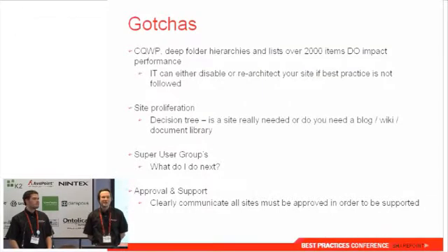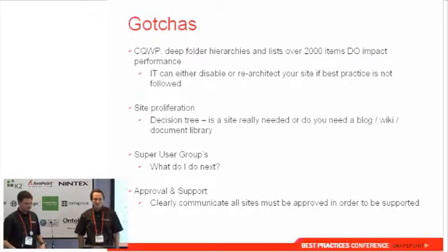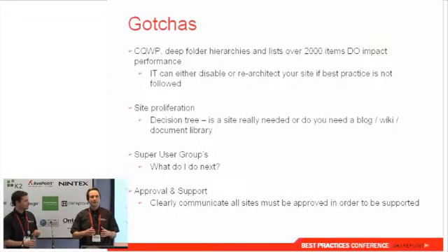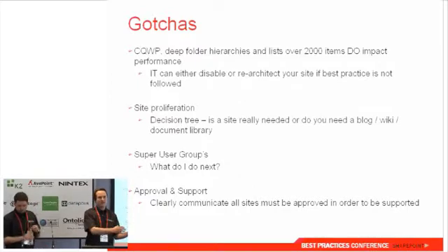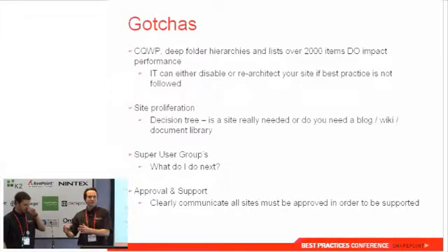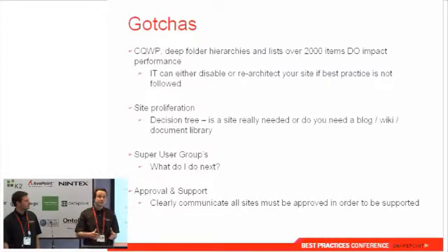What's happening? It's going to be a difficult question to answer, because the way we've looked at the implementation is we could have done it quite rapidly and just migrated the information into SharePoint and got people working in SharePoint quite quickly. But what we've actually decided to do is a very structured approach. So finance were going through a big structural change, so we went with them. HR, again, across the whole organisation. I went for sales and IT because they were ready at the time. And for us, we've taken a lot of time for each function to work with them, identify the data, all the meta tagging, all the content types, and then migrating.